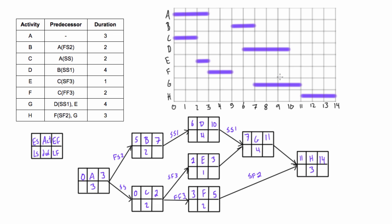Now we can compare and check if we got the same values from our Gantt chart and the early start and early finish of our PDM network diagram. A goes from zero to three - same on both. B goes from five to seven - on the Gantt chart it also goes from five to seven. Activity D goes from six to ten - and on the Gantt chart it also goes from six to ten.